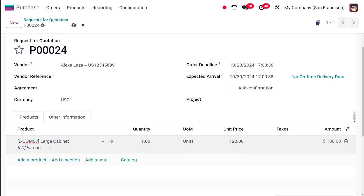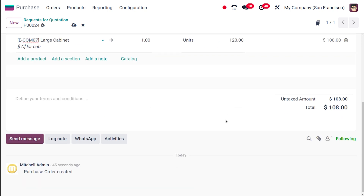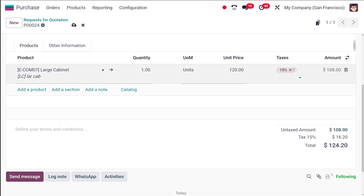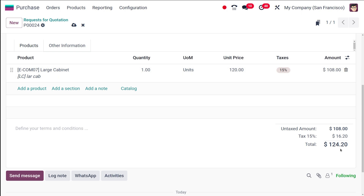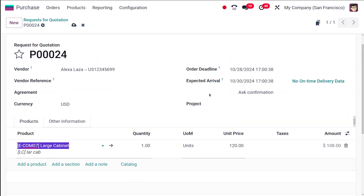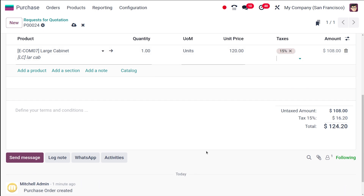The product code and name are set correctly. The quantity and unit price are populated from the price list. The expected arrival and order deadline have changed — it now takes only two days, which is the delivery lead time I set for Elixir. The unit price is shown and the tax is 15 percent. The total is shown as 124.20.